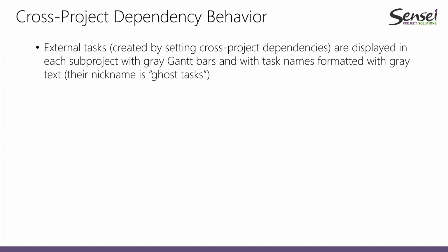I want you also to understand the behavior of cross-project dependencies. When you create cross-project dependencies, this creates external predecessors and external successors. These external tasks are displayed using gray Gantt bars with task names formatted with gray text. Their nickname is actually ghost tasks.